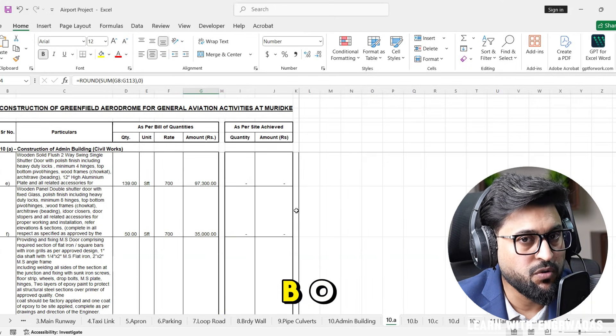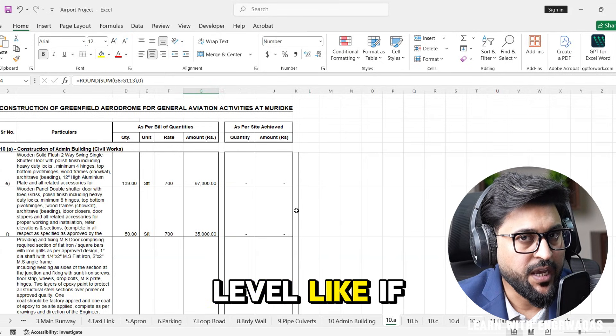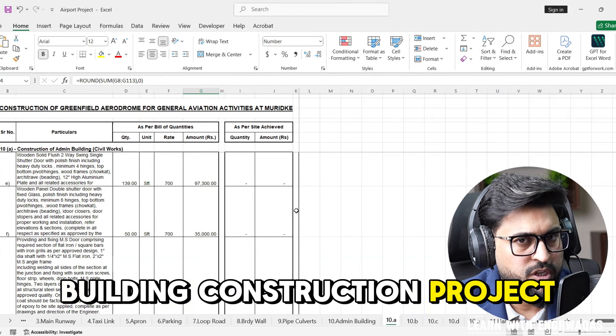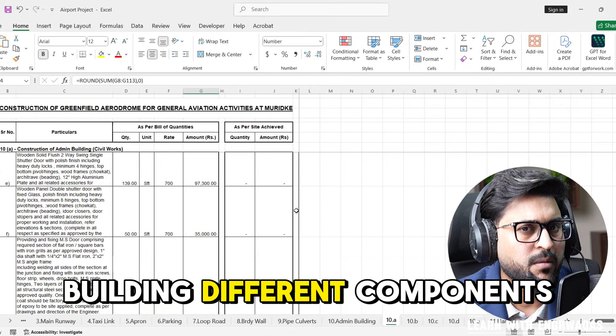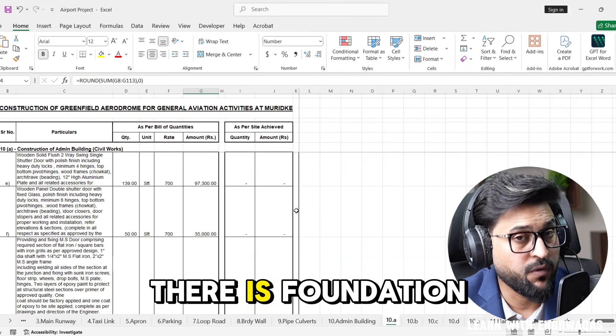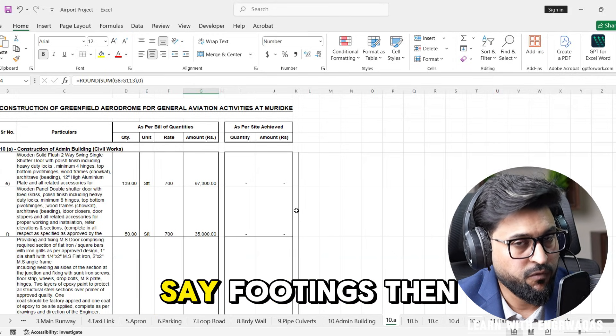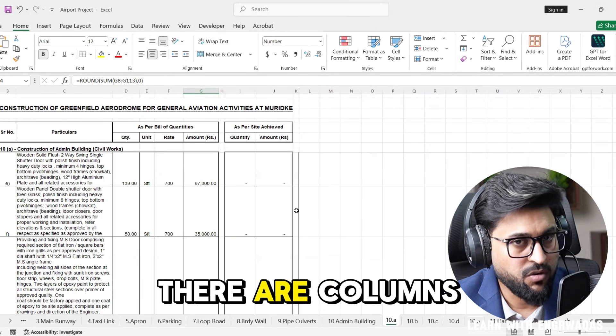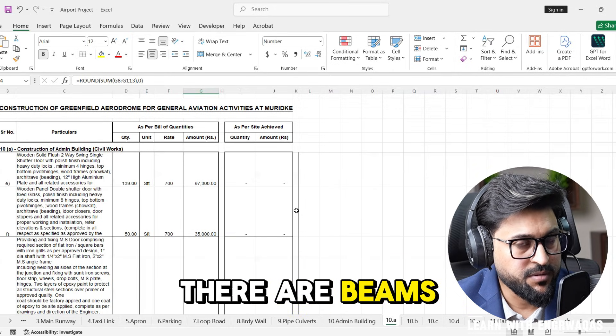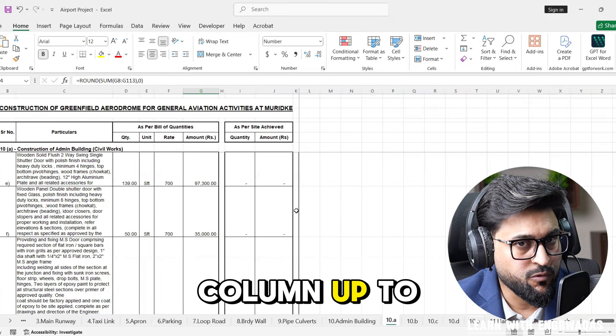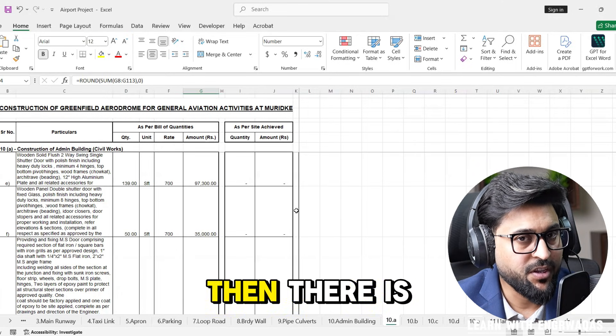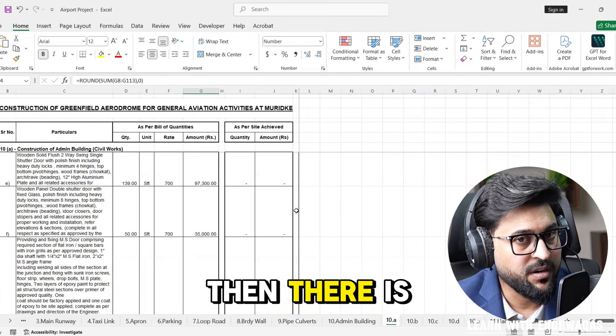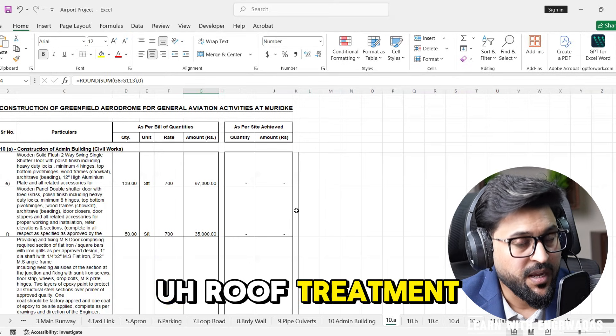If this is a building construction project, everybody knows building has different components. First there is foundation or footings, then there are columns, there are beams up to slab level.